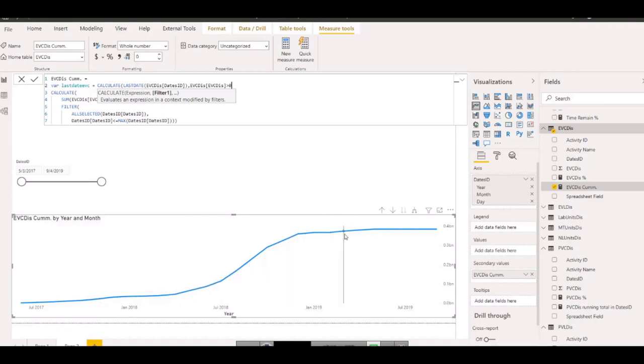But when time period is moving and the earned value is not moving, it is constant. That means from this point until the last point, earned value is not increasing, it's 0. Earned value is 0, but adding the previous one, so the cumulative value stays the same. Although the cumulative value should increase if the current month value is increased, the current month value is not increased.